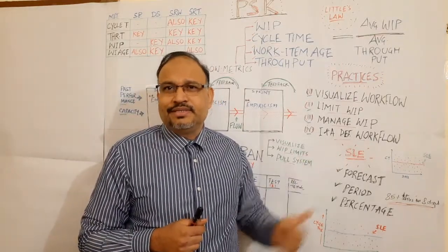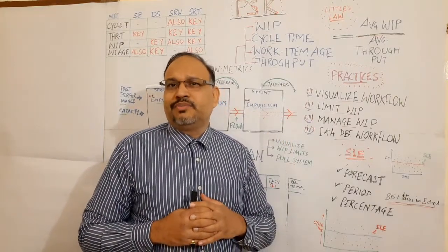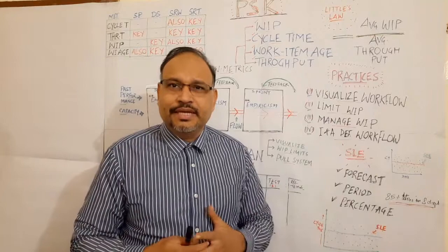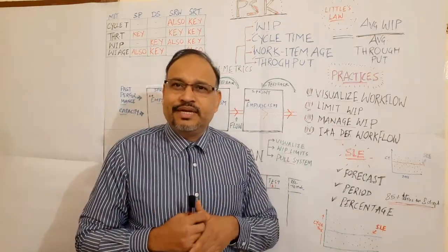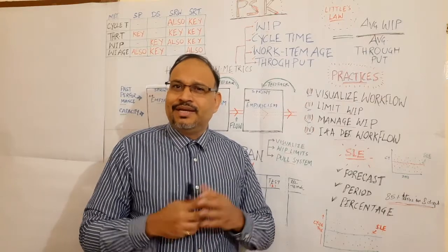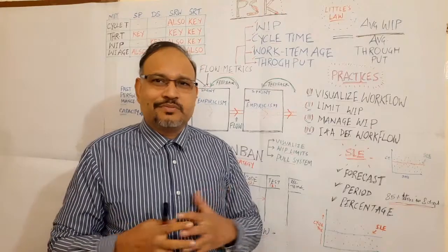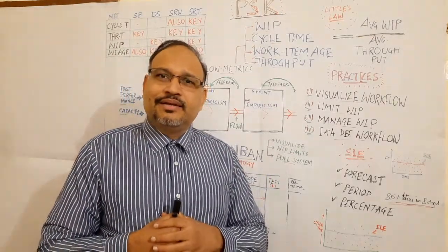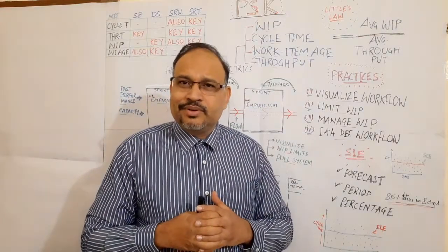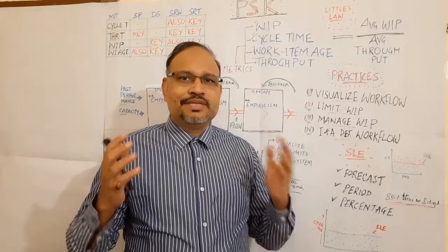Point to note here is, can a PBI take an exception of the work in progress limit if there is some urgency? The answer is yes. If it doesn't require you to instantly change the work in progress limit, it's okay to take a PBI as an exception. Then you go to the retrospective and try to understand why that situation happened, and should we really need to change the work in progress limit to address these kind of situations in the subsequent sprints.